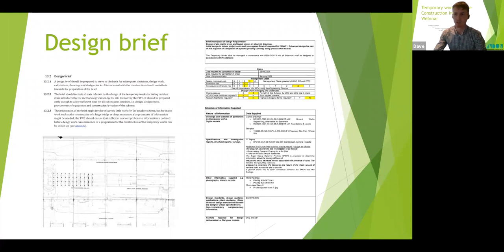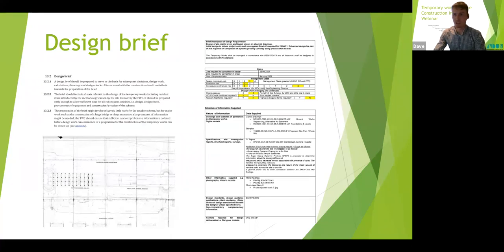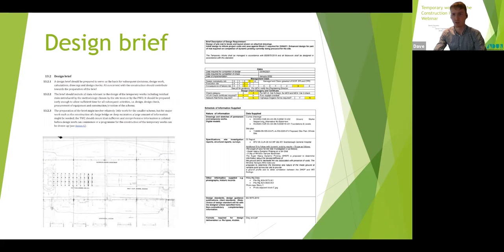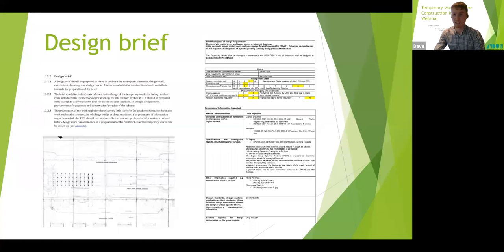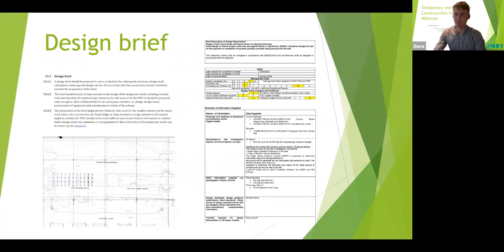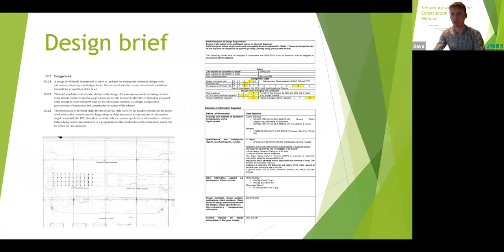Just saying we need some propping here doesn't really help us usually. A bit of information on equipment required—if you've preferred to go down the line of like fabricated steelwork, proprietary equipment, this can save us a lot of time and saves us a conversation down the line with what you need. So that kind of thing. And yeah, any other high risks or any other hazards to the project that you can see from your point on site. So that's kind of an overview of the additional things to think about when completing a design brief beyond the obvious of what is needed.